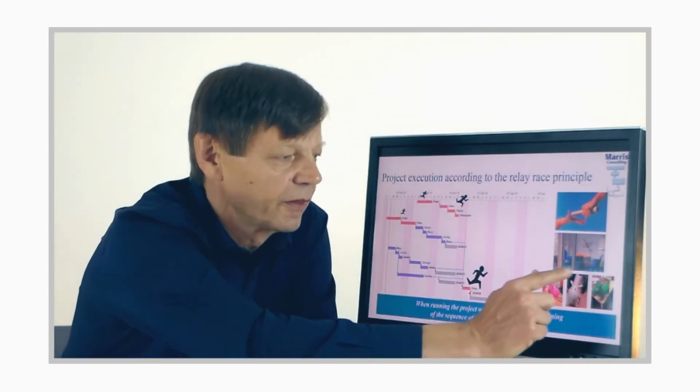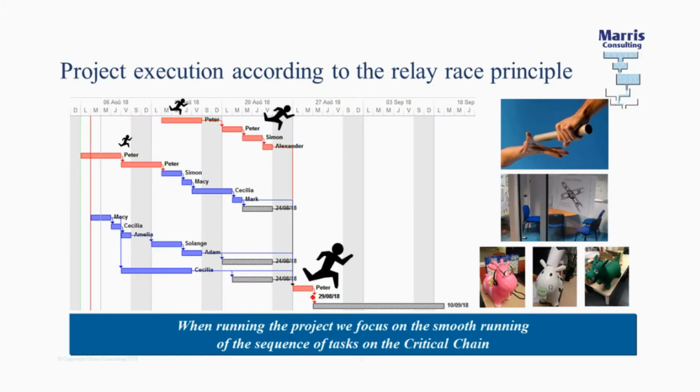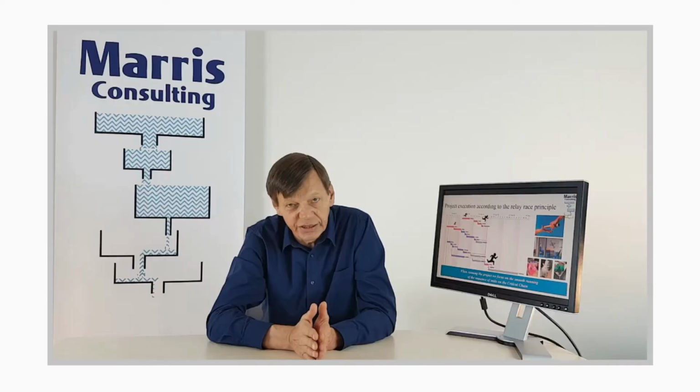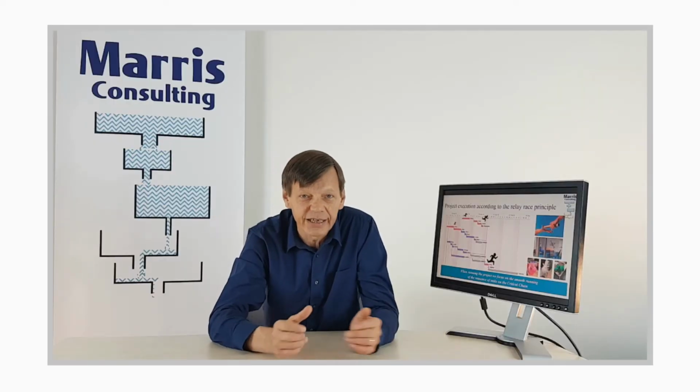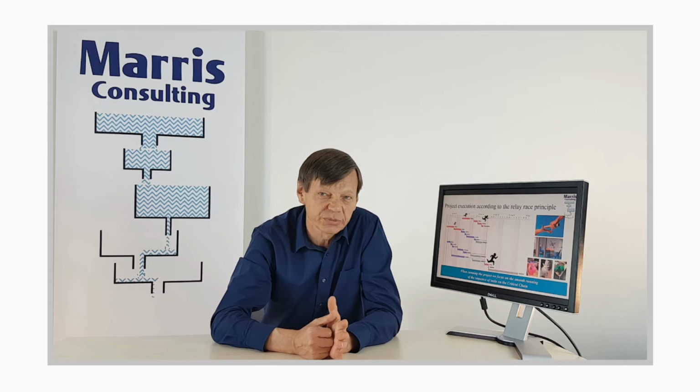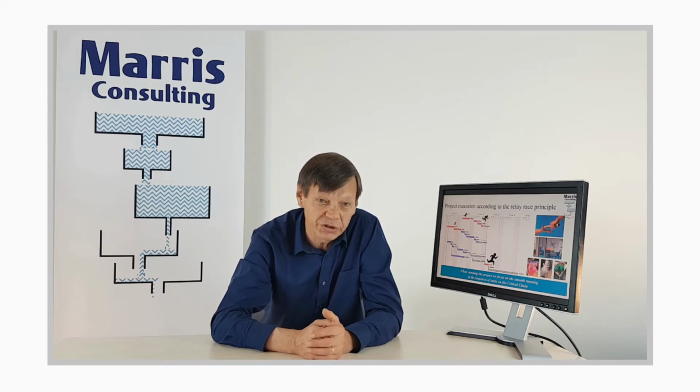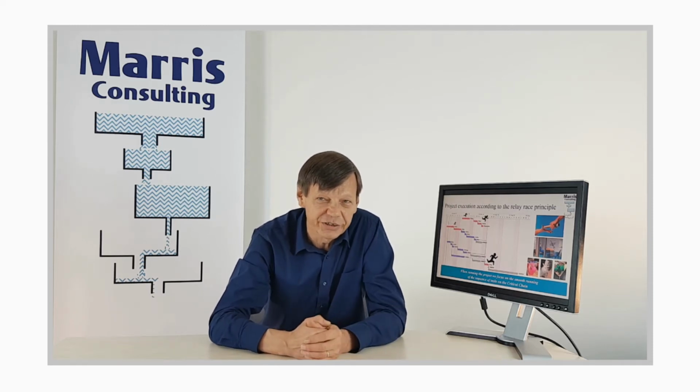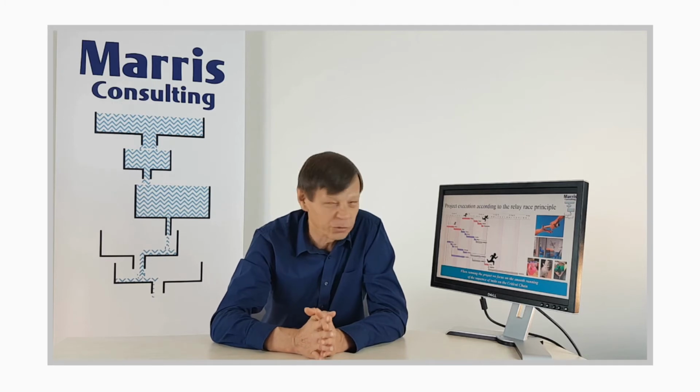Another thing we also do, which aims for the same result, is that we create critical chain rooms, special offices, where people can go to work when they are on the critical chain. So when Simon here has to do that task, he will go to that office. In that office, it is protected against interruptions. That's to say, there's no possibility of ingoing phone calls, and maybe there's somebody guarding the door to make sure that they will not be interrupted.